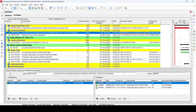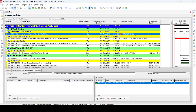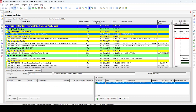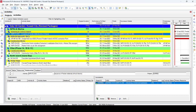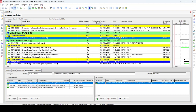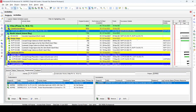However, this method will not give 100% accurate results. When we apply the filter, activities with finish-to-start 20 days or 15 days lag appear correctly, but some activities with no lag also appear. The reason is that the Activity ID itself contains the letter 'd', so the filter picks up 'd' from both the successor detail and the activity ID columns simultaneously.